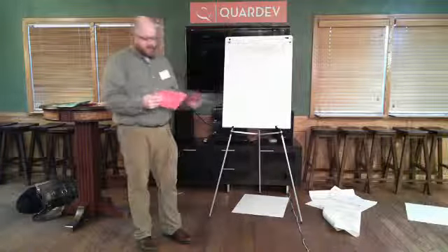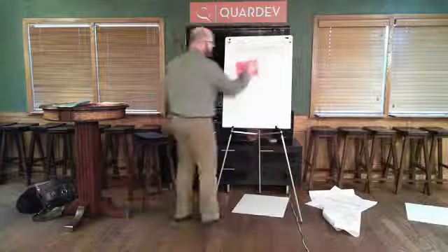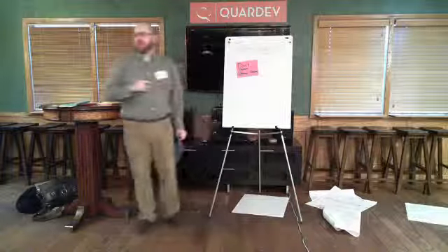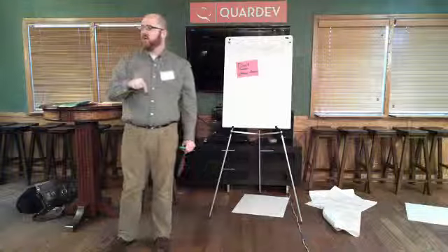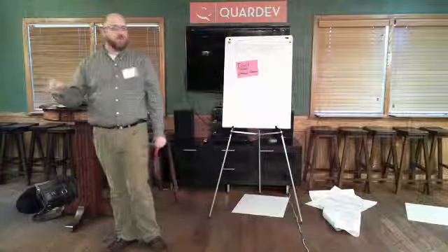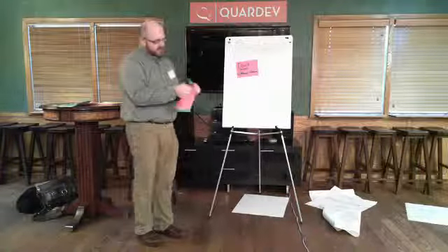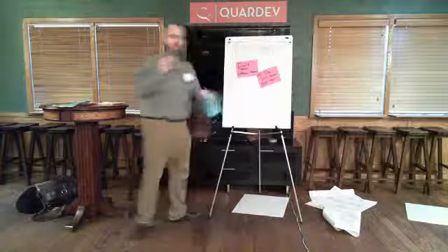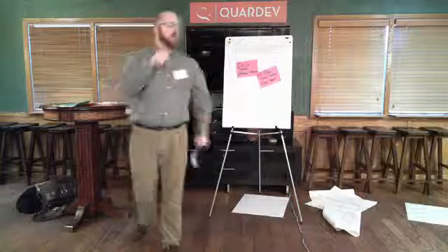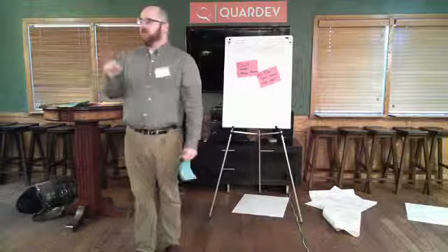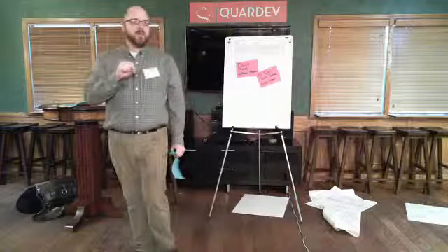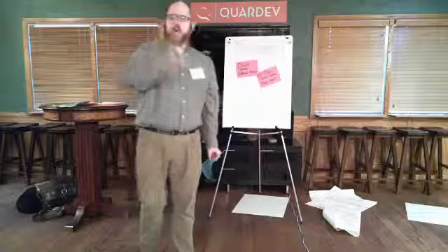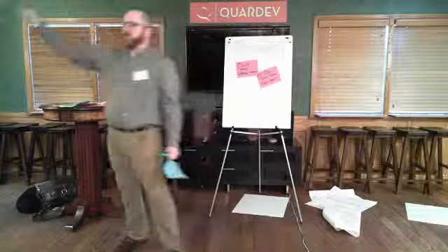So what do we mean by driving it? If you have a driver, you don't get anywhere without the driver. We don't do development work until we have understood what the tests are. And even more precise than that, all the development workers know what their test is. So you'll see this again as I talk about stand-up. We want our programming teammates to understand what is the test that you are working towards right now.